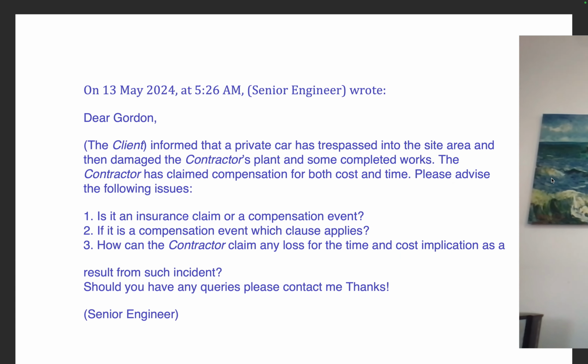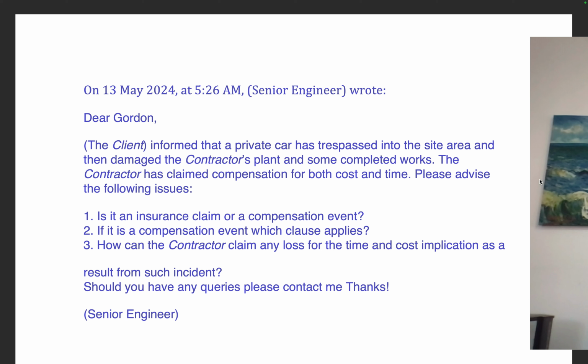For example, in the previous example, if I show you the example once again, let's do number 1. Is it an insurance claim or a compensation event? Talking about a car crash. So here they say trespass, but it is not a trespass. In fact, it was a car crash. So you translate the keyword into the contractual terminologies or contractual language. If you look it up for an insurance claim, you will never see any clause in the index section. Why? Because that term insurance claim does not exist in the contract.